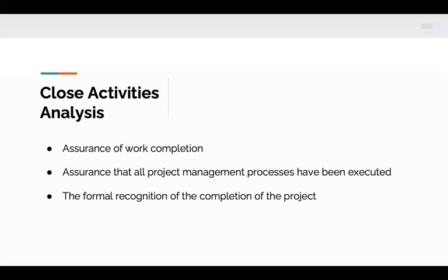The project closing process involves all processes performed to conclude all activities across all project management processes. For this project, the closing processes included the project manager's assurances that all the project work was completed, and authorization by the Ministry of Tourism and other stakeholders for the completion of the project, an assessment of the various ethics and governance processes that were implemented, and concluding all administrative processes.